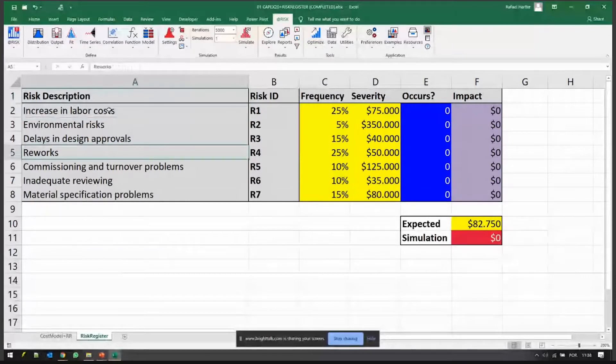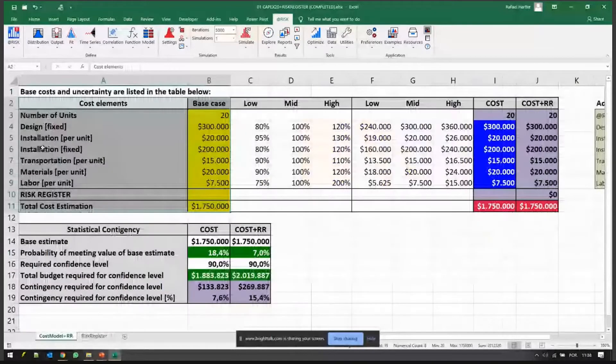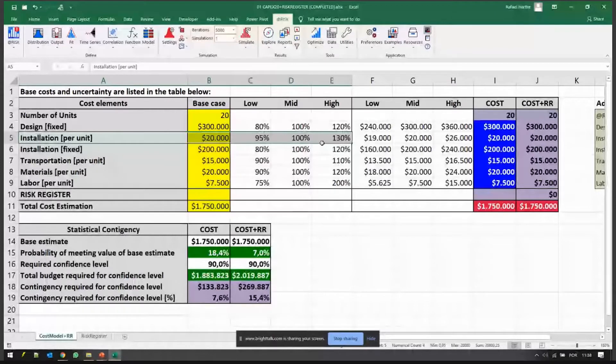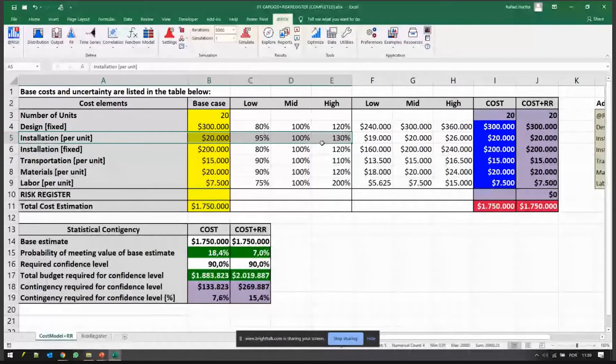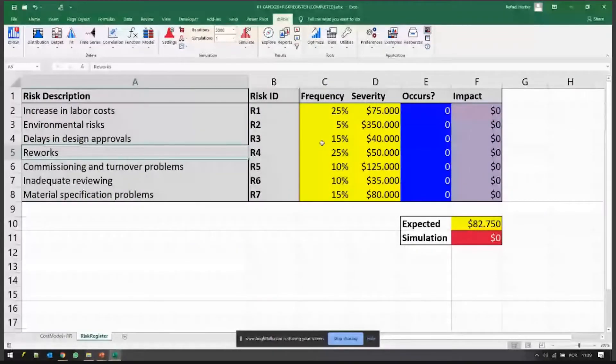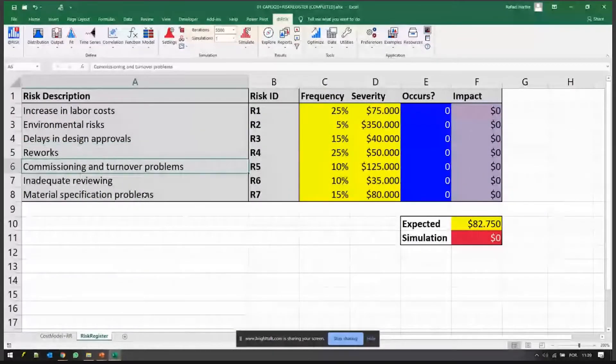You plan on doing all the installations here, but if something doesn't pass the quality assurance test or is not properly conducted, you have to rework on it and there's a cost to that. Commissioning problems, material specification problems.